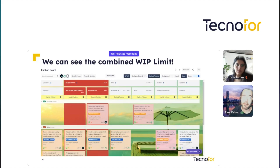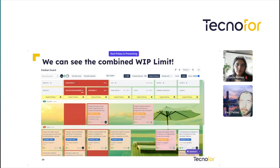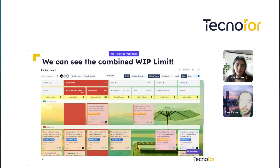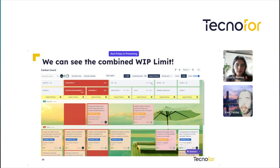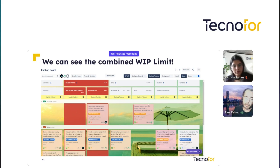In the next picture, you can see we can combine the WIP limit of the columns. The max in the 'In Progress' column is two and 'Selected for Development' is two. We have five tickets in both columns and we exceed the maximum. In that case, you can see the maximum is four because it's the combination of both columns. We can combine other columns like 'Quality Assessment', 'Ready for Quality Assessment', or 'In QA', and with this plugin we can combine these and treat them as the same stage.